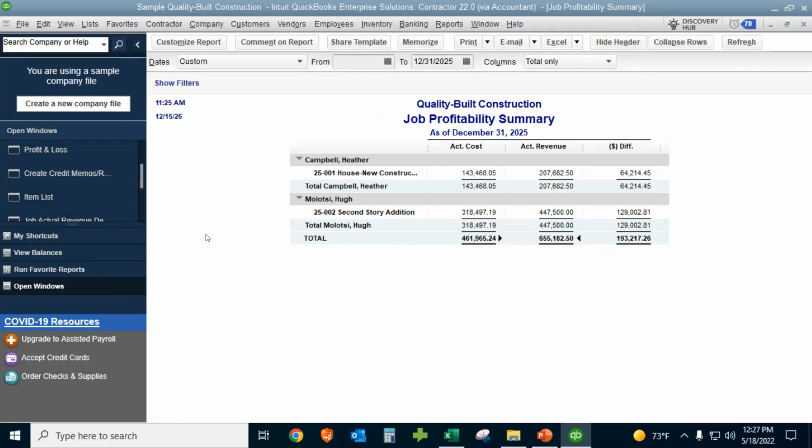We took over a client that was in a similar situation, and their accountant never went back and looked at the jobs after he closed them out. And there was a couple $100,000 sitting in construction in progress that never got expensed, that he never took the expenses for, that were on old jobs. And the bank was probably giving him credit for that on his line of credit.